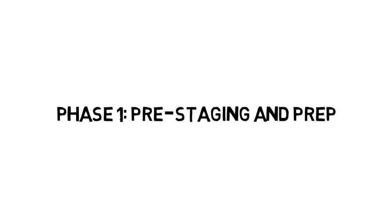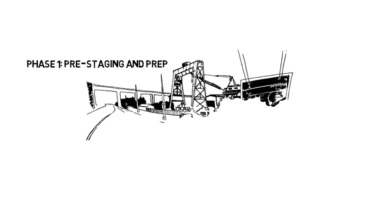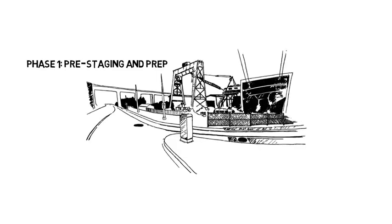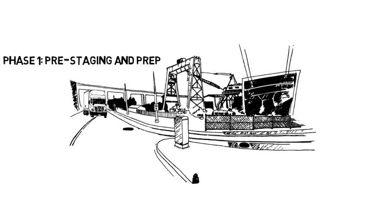Phase 1 is known as pre-staging and prep work. Beginning in April and lasting until June, you will see a lot of action at the upper and lower terminals preparing for the five-week closure. Don't worry, the tram will be running normal hours until June 23.